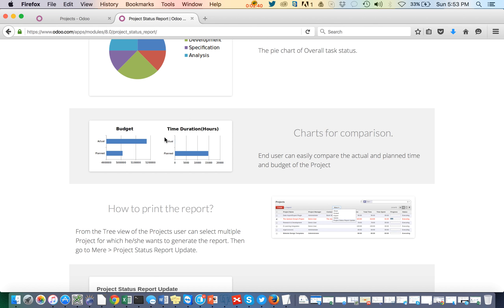For example, if Employee A is working on a particular task and the planned hours for that task is 10 hours, and the employee's hourly charge is $50 per hour, then the planned budget is 10 hours × $50 = $500.